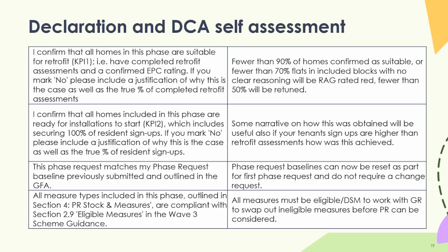Phase request matches my phase request baseline. Once you've submitted your phasing baseline that I discussed earlier, that's then classed as reset. So even if it's not as previously outlined in the GFA, that's fine. As I said, there's no requirement to go through a PCR.